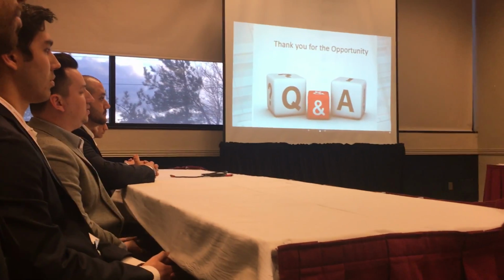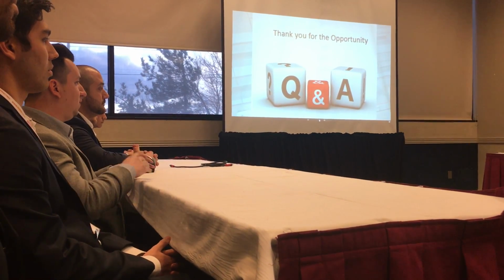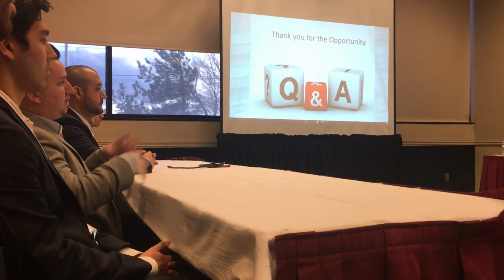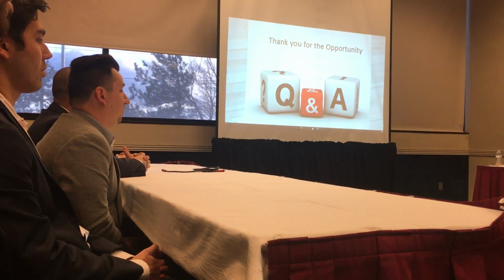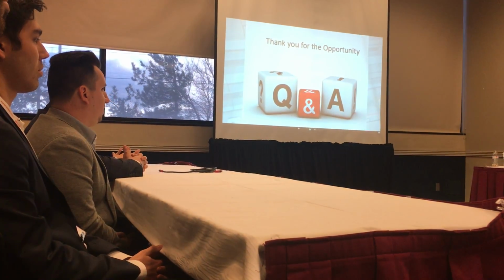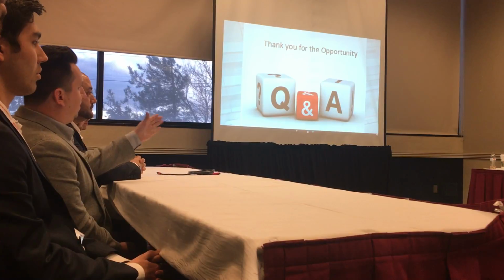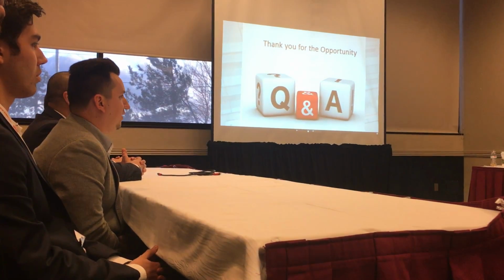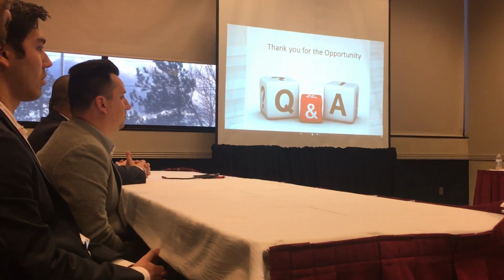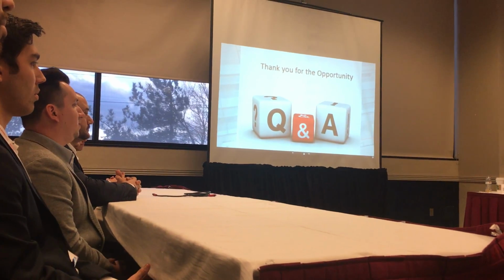I talked to my scheduler with this, and he said it's approximately, I think, 30 days for the overall finish on one floor. So that's all the finish, that's not the drywall. I feel like if there's only like 34 restrooms total, I believe, and an average of like 10 restrooms on each floor, you're talking about just a little restroom drywall, just demo that out. It shouldn't be taking that long. Just 5 days total, demo and the hanging of the drywall as well. And for a $12,000 difference with the 1 hour rated walls, I think it's a good investment for the owner as well.